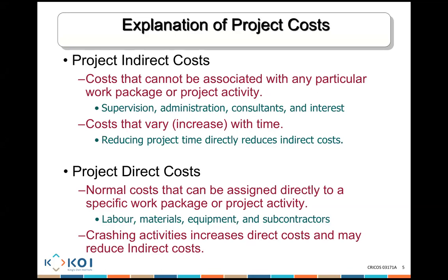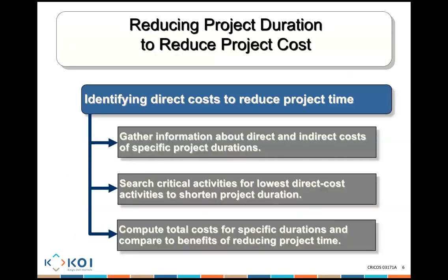If I say I need to finish my project quicker, so I'm going to get 2 more developers, they will cost me money. Yes, you crash the activities. Yes, you finish earlier, but it's costing you money, specifically the direct cost money associated with one specific work package. So you crash an activity, it's going to mean that your direct cost is going to be increasing and your indirect cost is going to be reducing.